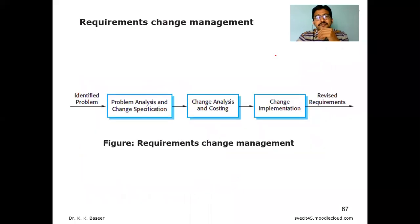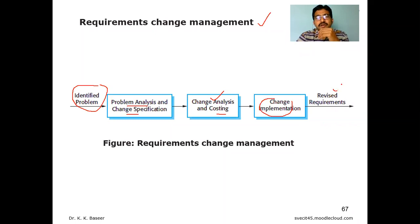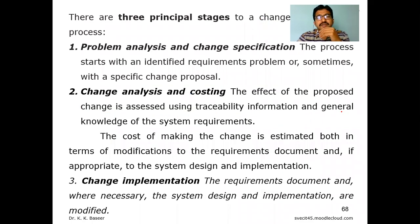The second sub-topic in requirements management is requirements change management. In change management, you first identify the problem, then analyze it, and check for any change of specification. If there is one, apply change analysis and check whether the cost is acceptable, then implement the change and release the revised requirement. Once the problem is identified, analyze the actual problem, see if any change in specification is needed, and if the cost impact is acceptable, implement the change and release the second version of the solution.